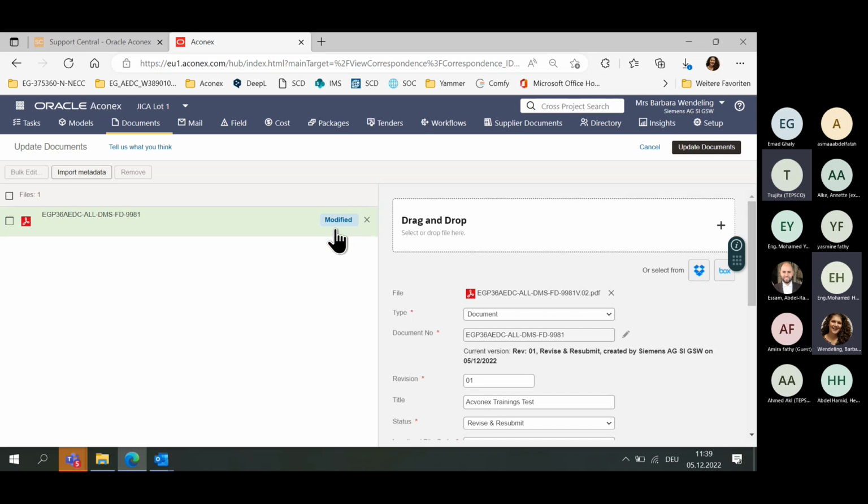Now I have here modify. So I can think, will I really modify an existing document? In this case, I will, because I will submit a version 2. But if I want to submit a version 1 the first time, then something is wrong. Then the number is wrong, or we already used this number. And then I have to check before I submit anything, because otherwise I will really modify this existing document.